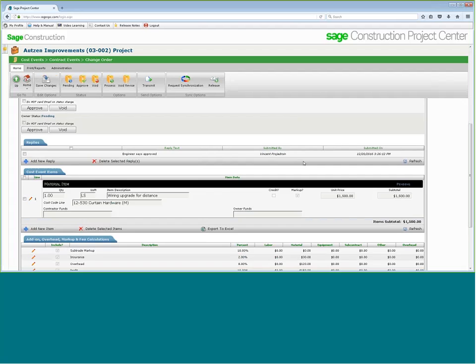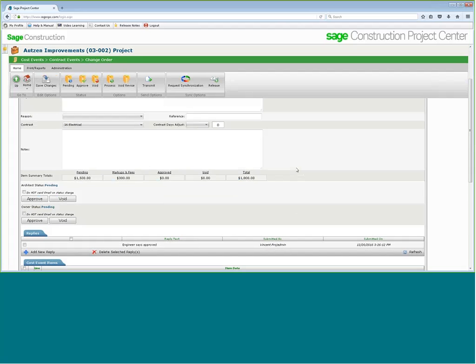And just like on the commitments, we can put in all of the different event information, generate what cost code has it worked on, is this material, subcontract, labor, all these changes can be done. And we have a multi-level approval to allow your architects, owners, the GC, and even your accounting to come in and approve their portions before it syncs back over with the general accounting side.